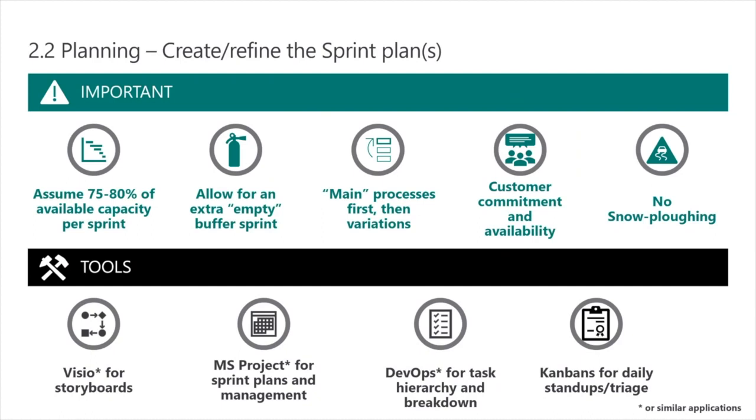That time does get used up. Where you can create contingency, and we'd recommend you do create contingency, is if you think you can deliver this in 6 sprints, add a sprint number 7, which is empty. It has no committed backlog allocated to it. There's nothing in it. You use that sprint to absorb any things that go wrong during the first 6 sprints.